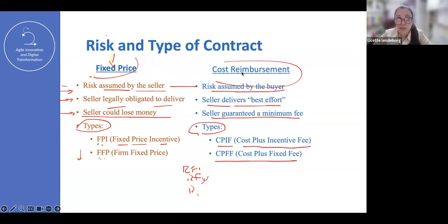Now, cost reimbursement are those contracts where FIU would tell me, I haven't received any proposal like that, but just to provide an example: listen, we are going to pay every extra hour that you spend getting ready and preparing the learning material. Let me know how much money we need to pay you on top of the 23 hours.